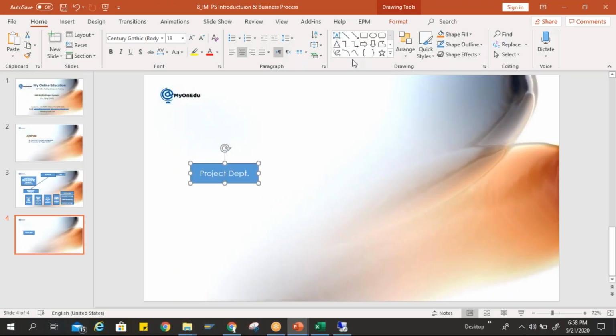So for my project, I need material and I need services. Okay. So when I need material, I can have two approaches. Whether we can check my existing stock. If it is there, then it's fine. We can receive the material from that stock. Otherwise, we need to go for procurement. So how we are receiving these materials from my stock, on what basis, we'll discuss later. But when we are going for procurement, how can we go for it.